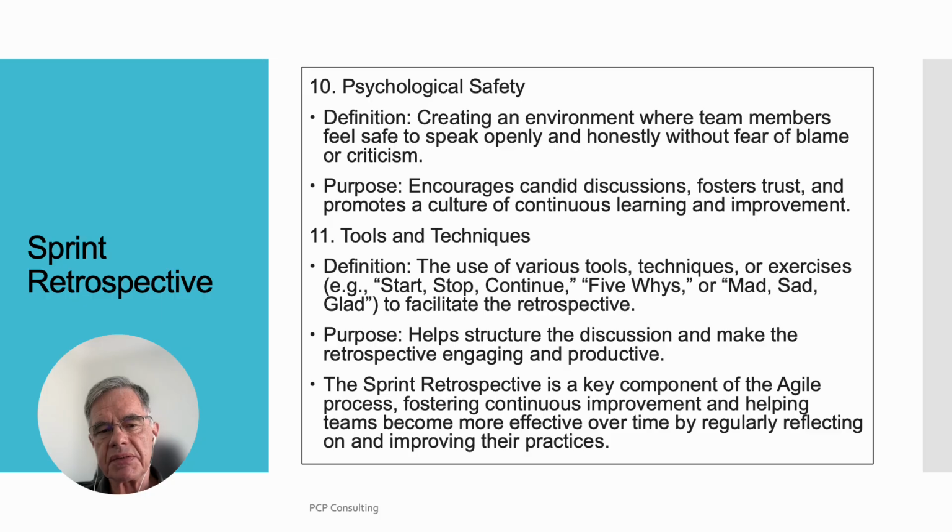Tools and techniques. Definition: the use of various tools, techniques, or exercises, for example, start, stop, continue, 5 whys, or mad, sad, glad to facilitate the retrospective. Purpose: help structure the discussion and make the retrospective engaging and productive.